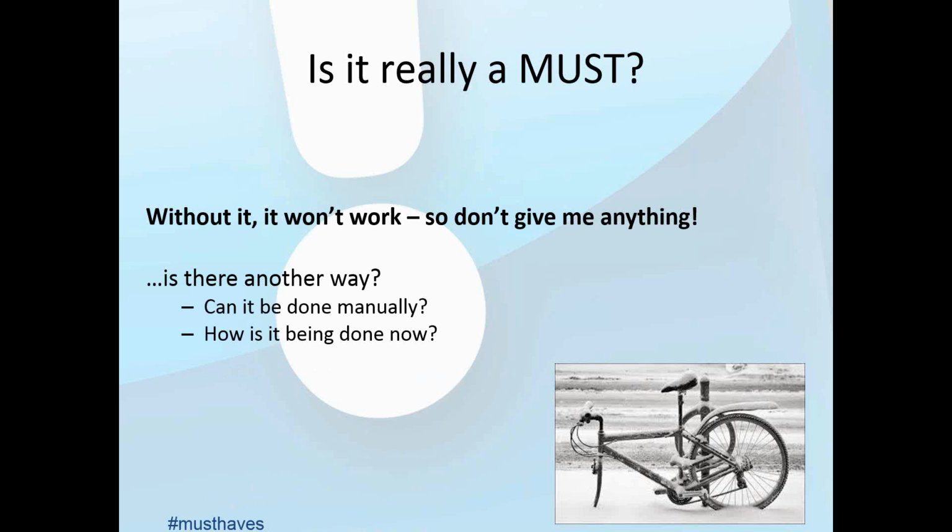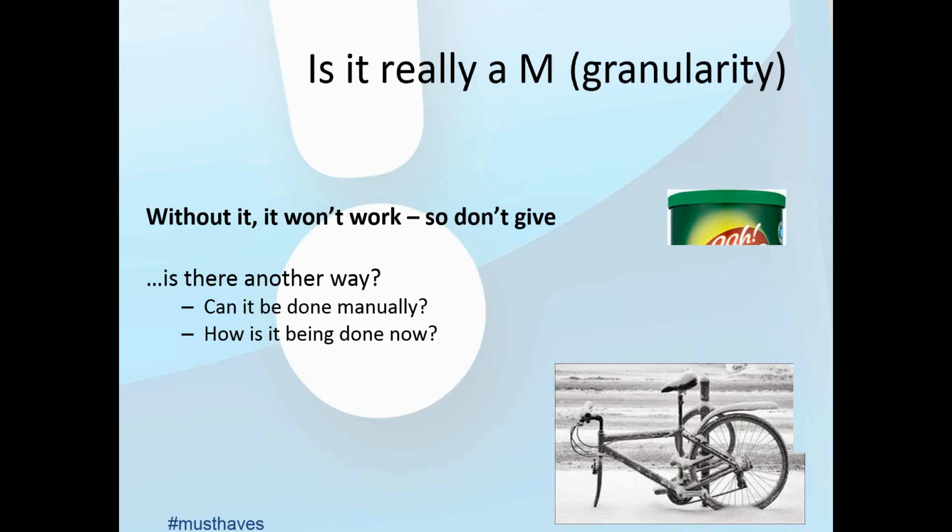Okay, it's a should, and we'd certainly like to get it done. So sometimes you can look at, well, there's a workaround, and you'd be amazed, even in quite sophisticated projects, how much a manual process or a manual workaround can actually take a must down to a should. And this gives you the flexibility so that you can hit your deadlines.